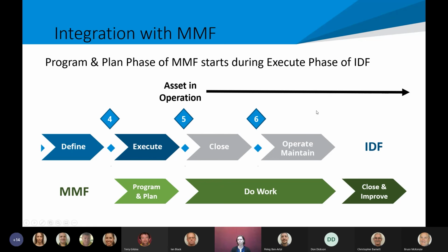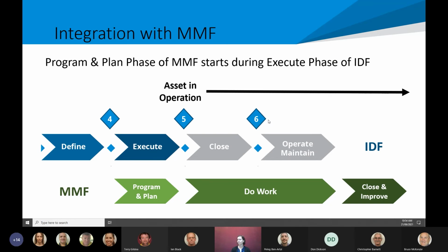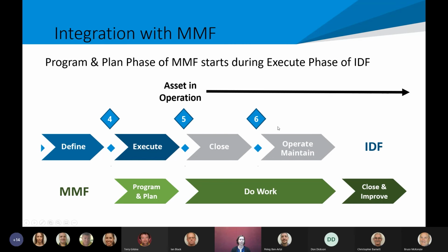And we have systems and processes in place through contract management and ECM to call up those periods and check them. The thing we are very conscious and clear on is that it is the responsibility of the project manager or contract manager to be monitoring that. So even though the project might close at Gate 6, they are still accountable and responsible for that defect period. We made that really clear as well.